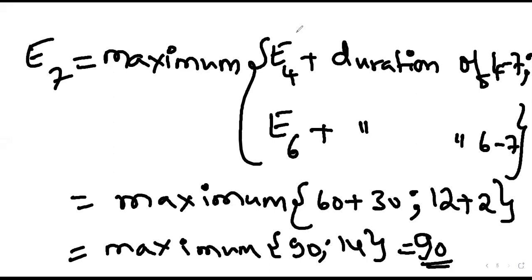Are you getting this? Only then can the next activity start, that is, the conference. So that is the reason the maximum value is considered. That is the earliest possible time by when the project manager can actually start the activity. Is it understood? The same concept we will write in the form of notes.